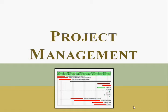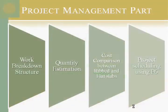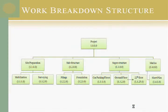The last part of our graduation project is the project management and scheduling. We have four divisions: the work breakdown structure, quantity estimation, cost comparison between the ribbed slab and flat slab, and project scheduling using Primavera P6. For the WBS, the project is divided into site preparation work, substructure, and the marina. Site preparation includes mobilization and surveying; substructure includes piles, foundation work, car parking floors, and ground floors up to level 22.